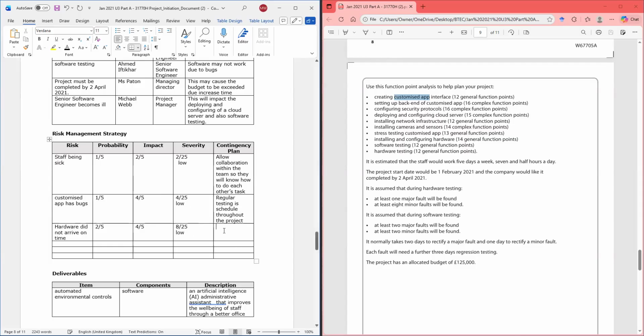And what I'm going to do, I am either going to have another supplier on standby or order the equipment way in advance. So my thing is, I'd rather order equipment 6 months in advance.